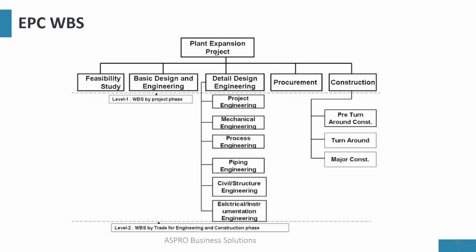Then the third way is, let's say you're contracting work out, and so a vendor is going to be managing monitoring and evaluation, M&E. Let's say you're outsourcing that to a company, right? M&E, you can also create a line for them. I'm just showing you the different ways of creating WBS elements. You can create a line, and so the contractor's work will be decomposed under M&E.